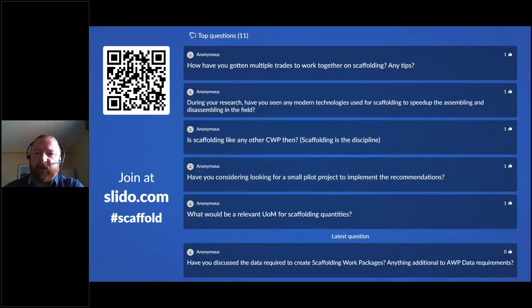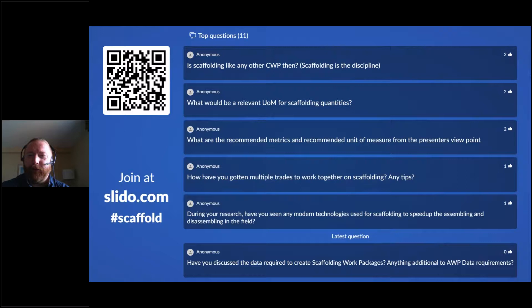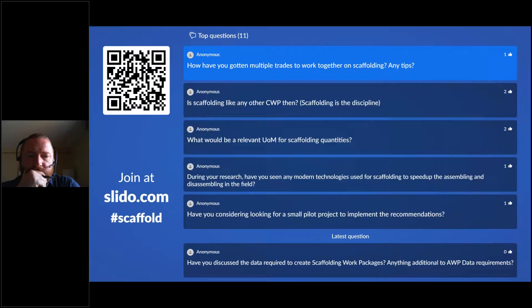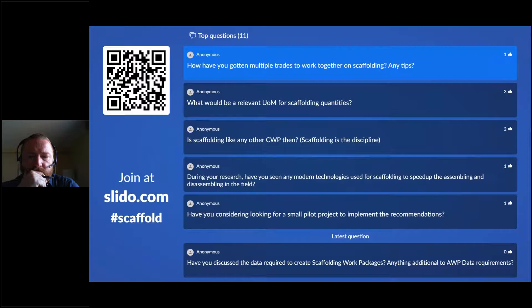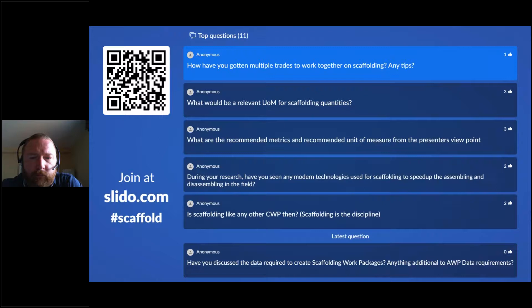Q&A: Have you gotten multiple trades to work together on scaffolding — any tips? The key to that is the project ecosystem. If the owner or project leadership team has said you will follow a process, explained how it adds value, controlled that process, and held people accountable to comply and to deliver — that's really the trick. If it doesn't work, people say 'I'll take care of what I'm responsible for on my own.' We have to take that option away by addressing it at the beginning.